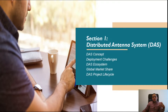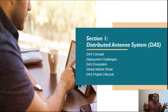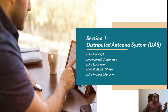When you deploy a DAS in-building solution, you typically start with a planning phase. After planning, you do design, and after design on a laptop or PC you go into the field, inside the building, to deploy and install your network. After installation you need to do testing to make sure the network is working properly, and after testing you do something called commissioning — adding your signal sources.